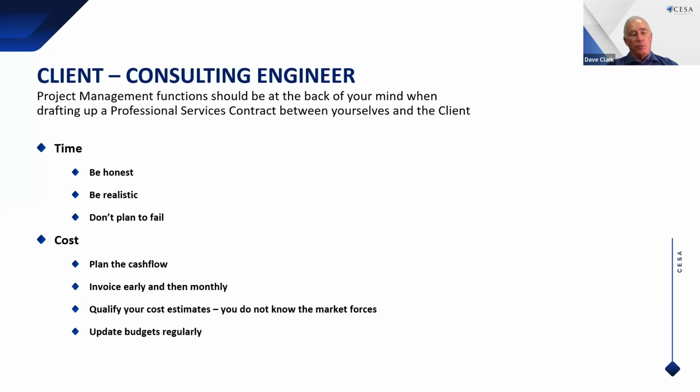I had one occasion where an engineer came to me and said, what do we do about this late tender? It's exactly on the budget. I said, throw it in the bin. Because engineers' estimates to me are just a guess. So you don't know what the market forces are. Then update your budgets regularly. Clients don't like to get surprises.